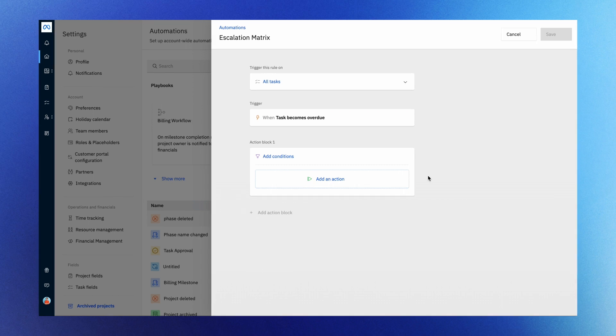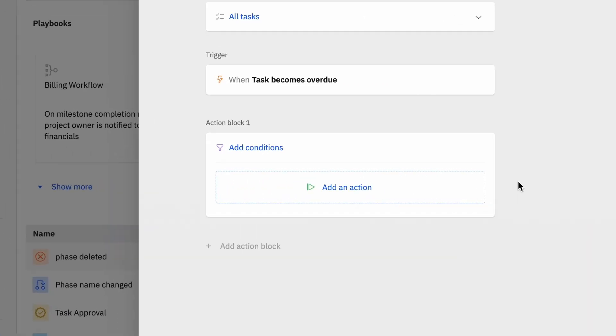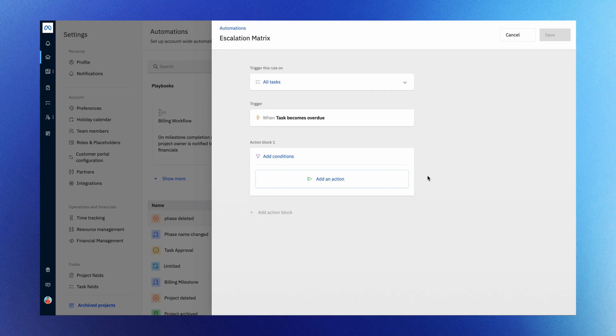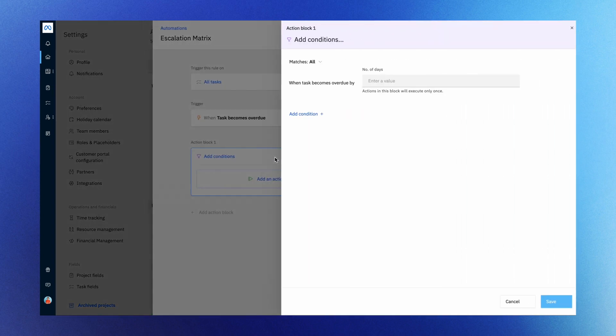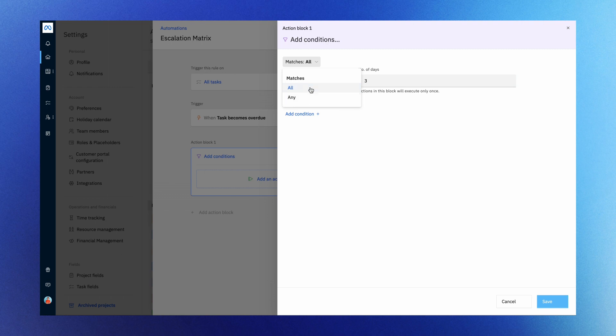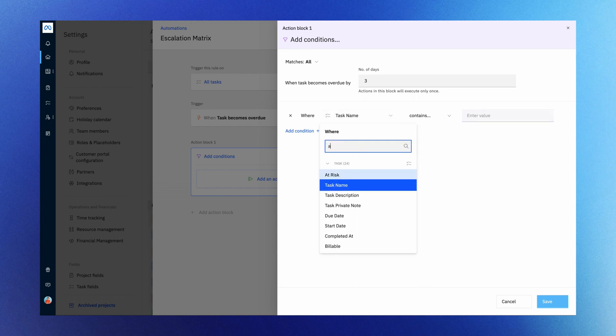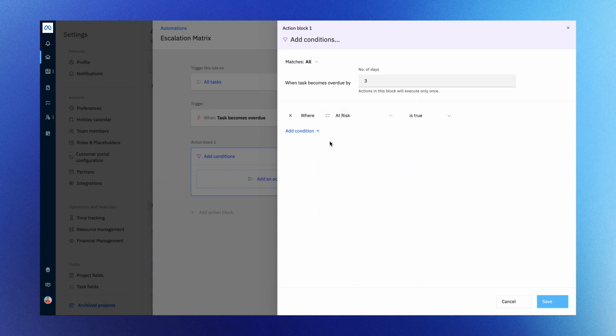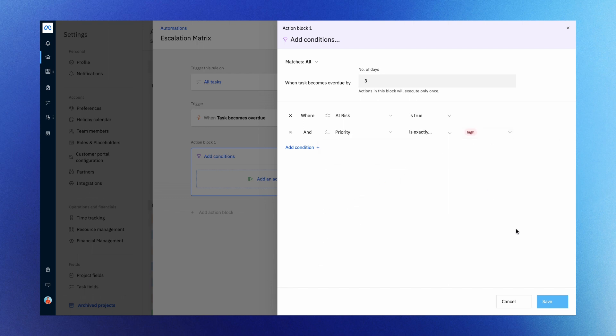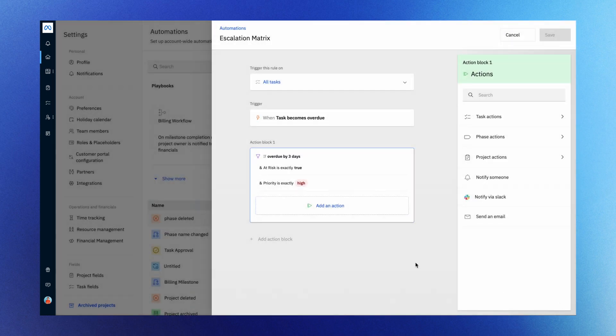Next, add the action block that contains the conditions and actions of the automation rule. To activate automation, your trigger must meet certain conditions. For instance, if you want to trigger automation when a task is overdue, set the days to three. You have the option to include multiple conditions and set the properties to match all or any of them. Continue to add other conditions such as at risk as true and priority as high. Once you have added all the conditions, save them.